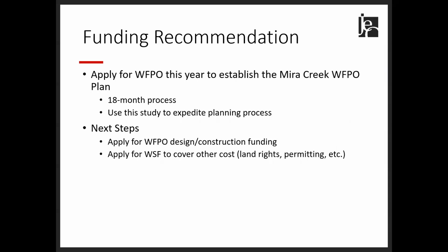So our funding recommendations would be to apply for the WFPO grant this year to establish that step 1 watershed plan. That's typically an 18-month process. And the study that we are currently working to complete would expedite that planning process. The next step would be the step 2 I mentioned in the previous slide, applying for WFPO design and construction funding. Now, the water sustainability funding previously mentioned could be used to cover the other remaining costs, the land rights and permitting, to help narrow the gap in funding needs.